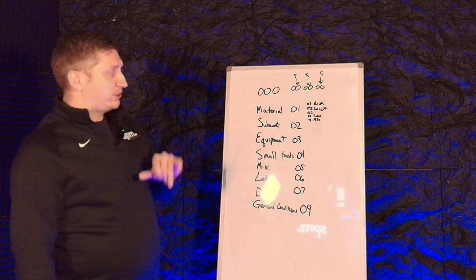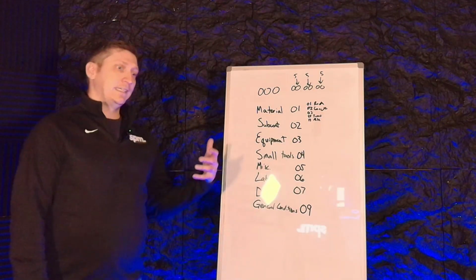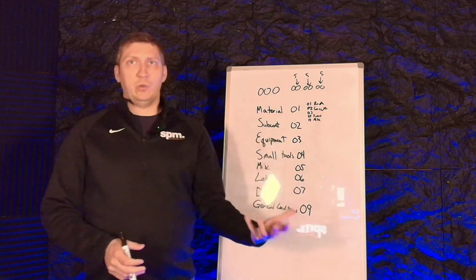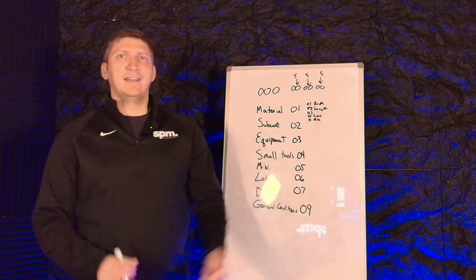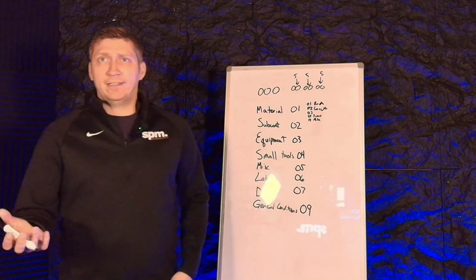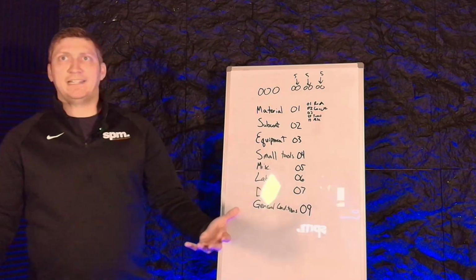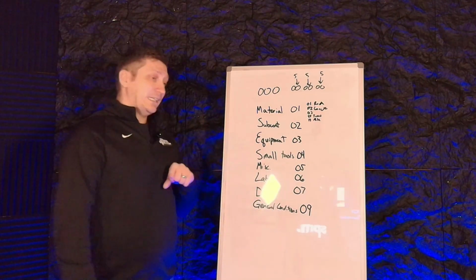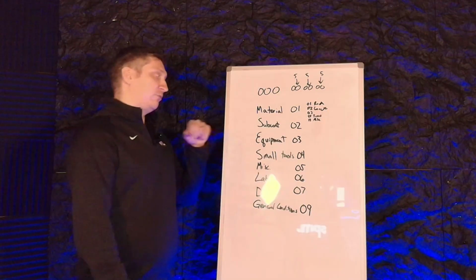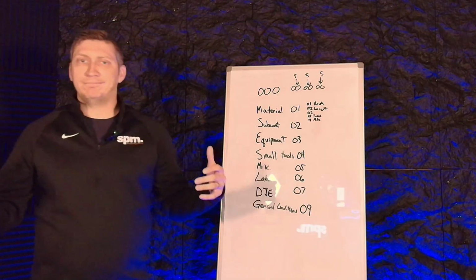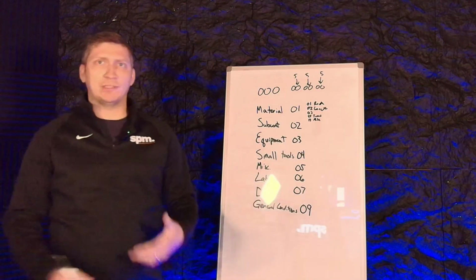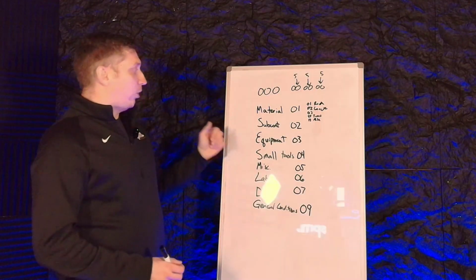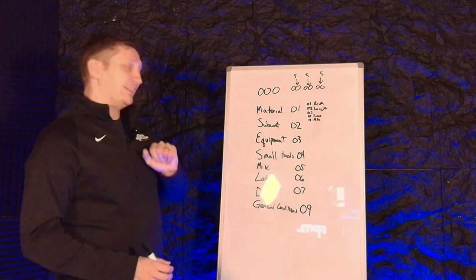Rented equipment is 02. And that's because I might have the same thing. It's just I want to keep track of what do I own, what am I actually utilizing, and what do I rent, and what am I just getting value out of. I'm going to track 03. That's going to be fuel. I'm going to track 04. That's going to be other fees with my rental, whether that's hazard or whatever else, and so on and so forth. And then always a 99 code, miscellaneous equipment.